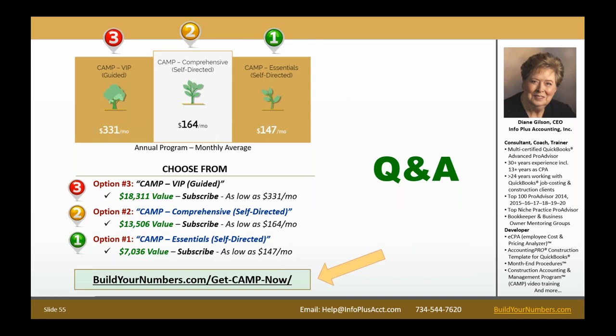That's probably the biggest dollar piece, but there are a number of other areas, like finding places where you can maybe get discounts on materials, or if you pay at certain points in time, negotiating using purchase orders, so that you don't work in what I call the B bouts. So you go to the landscaper and say, how much is it going to run to take care of this property? And they say, oh, that'll be about 5,000. And then the bill comes in at 5,500. So you're probably not going to argue with a B bout, but if you got a purchase order that says 5,000, then you're in better shape. Those are a couple areas.